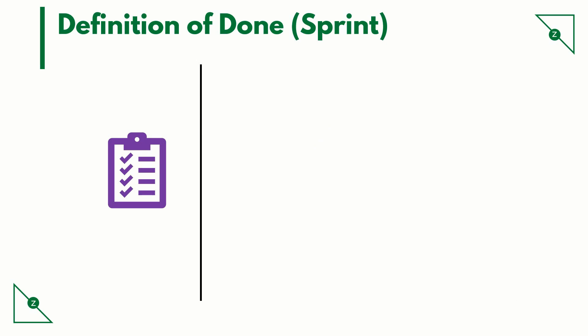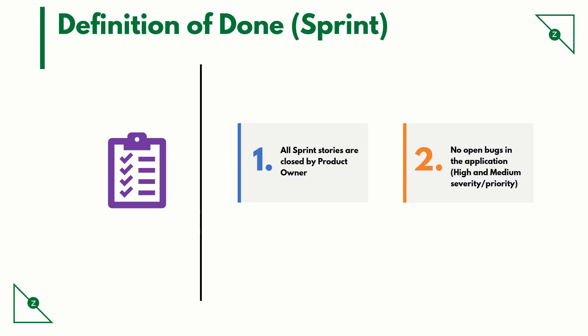Here are some example pointers for definition of done for a sprint. All sprint stories are closed by the product owner — that is, after verifying whether the functionality has been achieved. No open bugs in the application; this would be zero ideally when the QA passes on the story to the product owner.